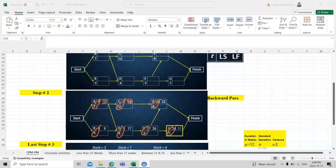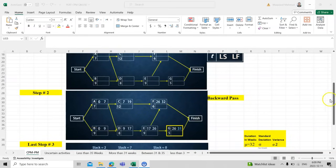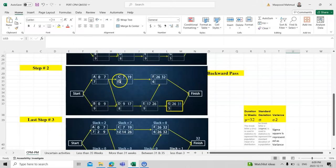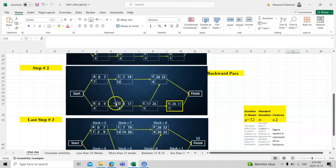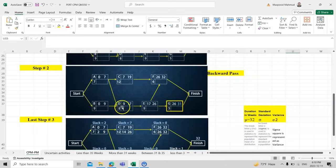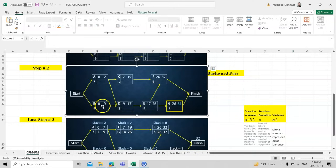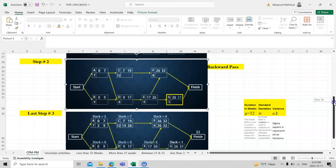Adding further, we get EF for G = 31. Now, to start Task C we must wait 7 weeks. For Task D, since both A and B must be completed, we cannot choose 7 — we must choose 9, the larger value, because both need to be completed. After 9 weeks we can start D, giving an early finish of 17 weeks.